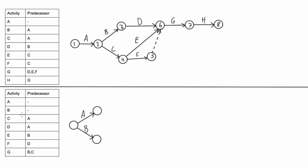Alright so next up we have activities C and D both depend on A so we can have an arrow coming off for C and an arrow coming off for D. Then next up we have activity E it depends on B so let's go ahead and draw an arrow coming off of B. Then we have activity F it depends on D so let's just try this out let's just draw another arrow coming off of D.